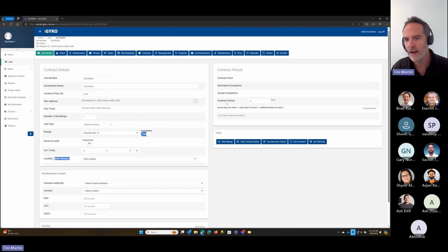Right. So just in relation to that, we've got our contract period. So you might find you've got a number of working days on your contract. And when you start building, you've only got that many days to build that home. Otherwise, you're due some liquidated damages. And the adverse weather can sort of offset these days, so you're not ticking up as quickly to those days.